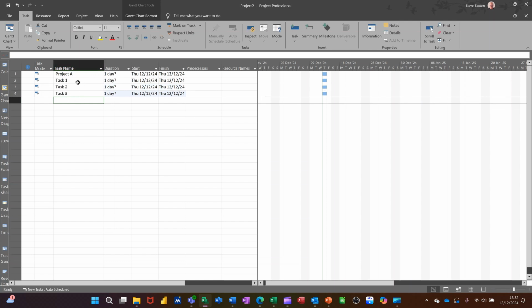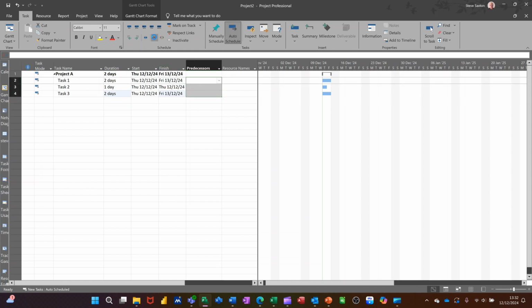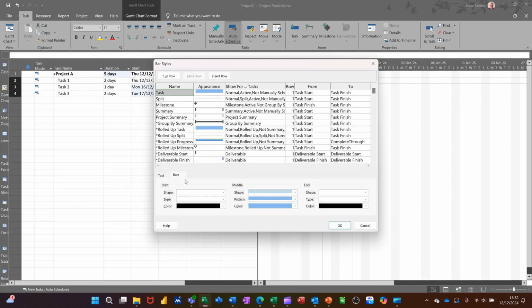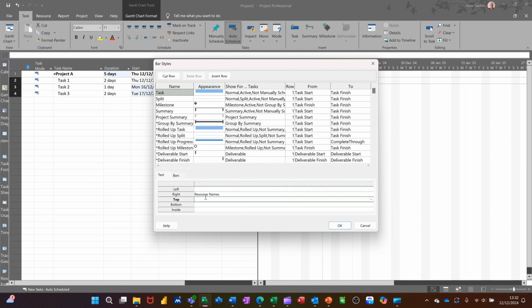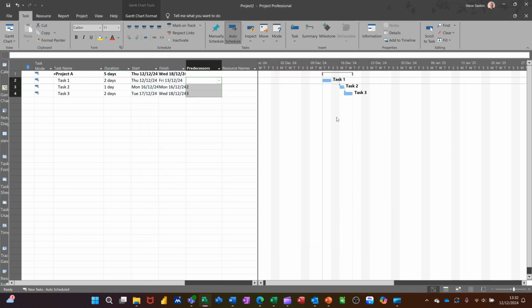So in Project, to create a Gantt chart, when you type, it automatically creates the Gantt chart. So I can now highlight these three, indent them across, like that, so they're now part of this. Change the durations, like that, and then you can see the thing building on the right there. I can also highlight all three of them and click on this chain link, which will link them together. And if I double click on the white, I can put the task name next to them. So very quickly I can adjust this and see the Gantt chart, how it sits.